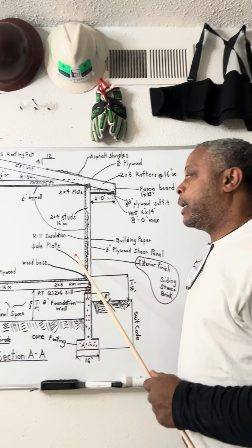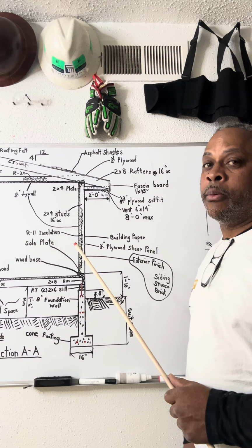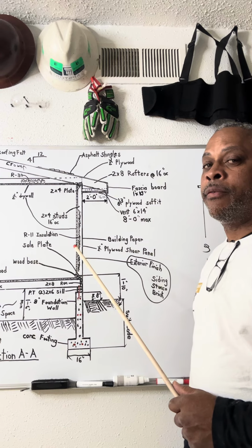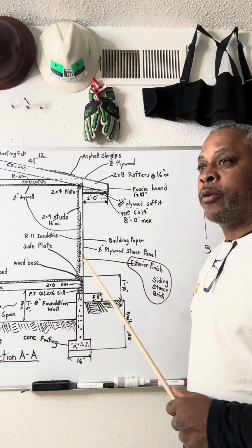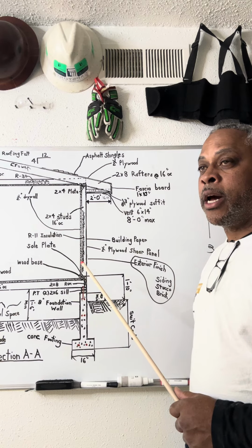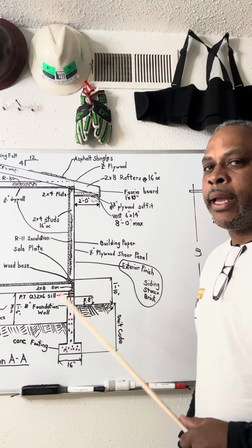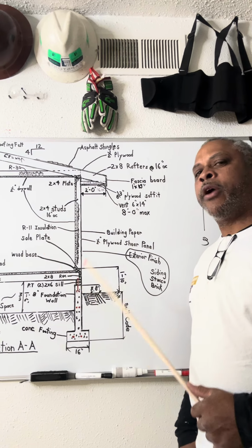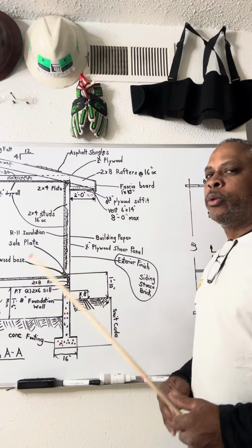Now, a lot of guys are getting away with buying the wrong nails and they're using them on your jobs. You got to be very careful on who's buying the hardware. Nails is hardware. Out in the South, the framer, he buys the nails. So he puts that in his price. In California, on the West Coast, the framing company supplies the nails as well. You know what I'm saying? But the crew does not have to buy it.